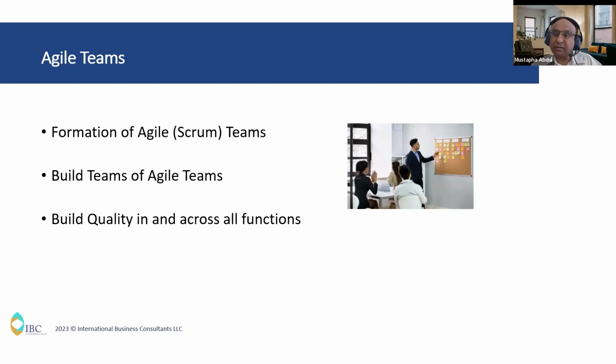And together with the developers, the solution architect, QA representative, maybe an engineer, an agile team will be 5 to 10 members typically. Now, in a company that's developing large software solutions, SAFe has a different method from other agile approaches. SAFe has what is called a team of teams, or a team of agile teams, and that is called an agile release train. And the agile release train is guided and coached by a release train engineer, which is a specific role. So what you see, there are no project managers, and I see oftentimes jobs being advertised by big companies saying project manager, certified scrum master, or a SAFe agilist or something like that. There is no project manager.